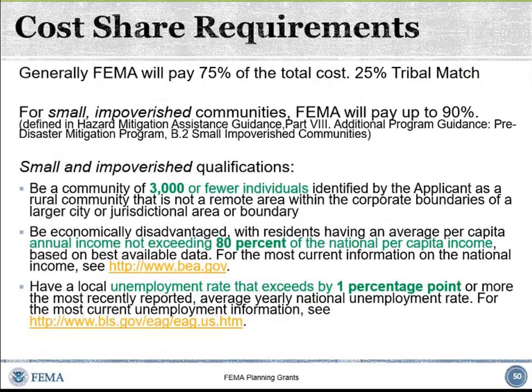You make an estimate, by the way, of pre-award costs at the time you submit your budget and your sub-application. At the time you put it into eGrants, you make an estimate. We have found that oftentimes that changes. There may be more expenses. Maybe there's a planning workshop that you didn't even know about when you wrote that planning sub-application, and lo and behold, here in April of 2019, you want to send your staff to that, but that wasn't included in the original budget as a pre-award cost.